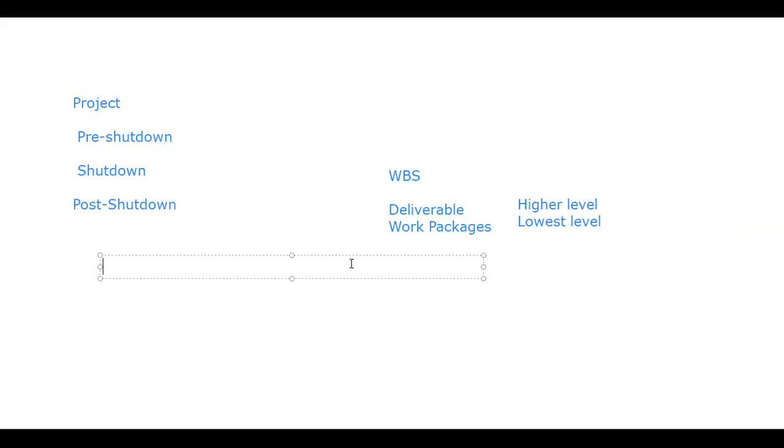Let's say I will divide this work into different categories. So in a real scenario, I have a shutdown for one plant. So I will write like this: plant, then my plant area, and then the area will be divided further into equipment, and then equipment further will be divided into the task or the activity we have to do. I will share one example regarding this breakdown. Now you can see plant, area, equipment, task, activity.